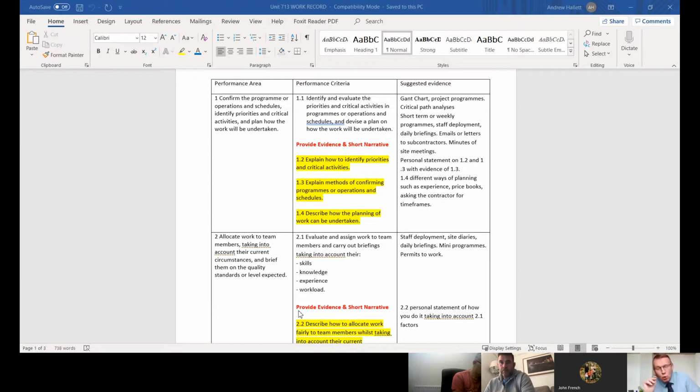I would also imagine sometimes you might get certain activities that are safety critical, and therefore take a high priority. Yeah, the weekend we had one. It was an existing culvert down in Northampton. They had to crash the whole culvert in, excavate the waste, backfill it with 6N, compact it, and then put the sleepers back in. That was the critical path that weekend. Brilliant. It was only a 30-hour blockade, but by the time the boys get the isolation and it comes back handed off, I think they got from 2 o'clock in the morning till 9 o'clock Sunday evening.